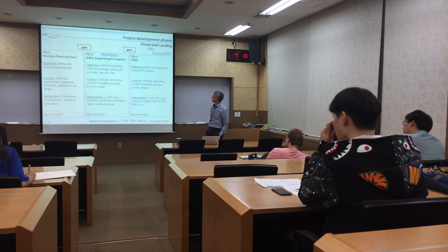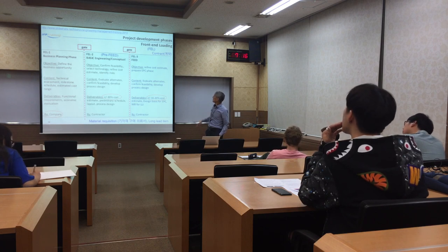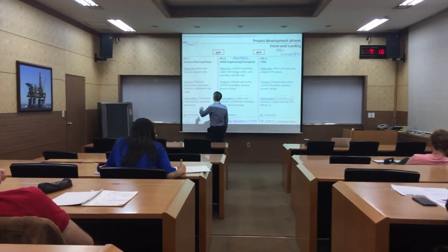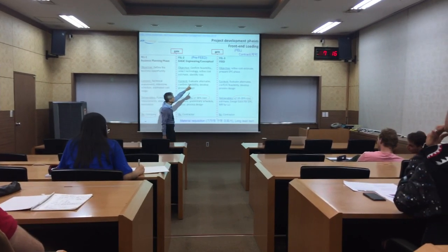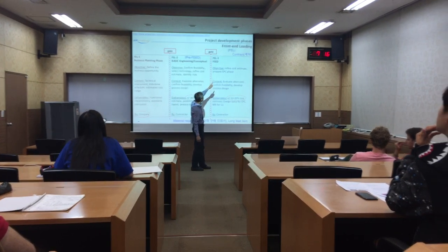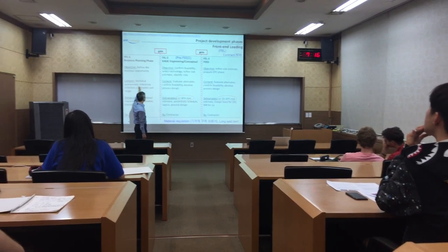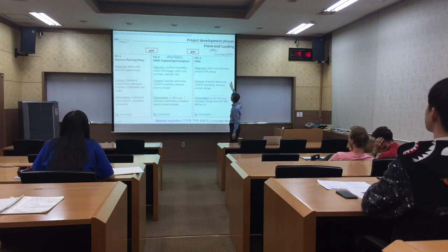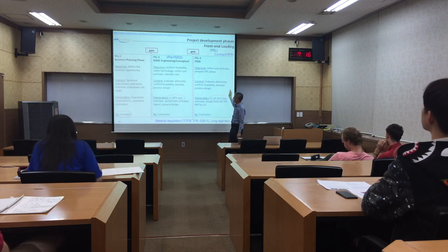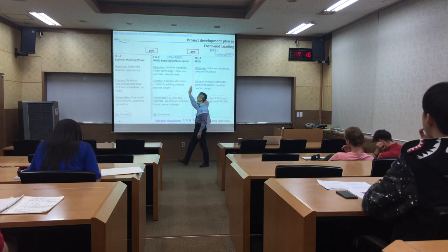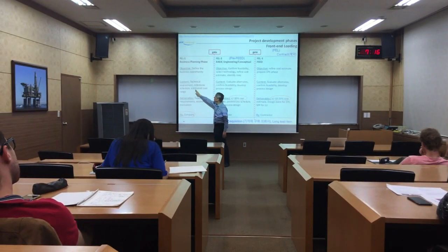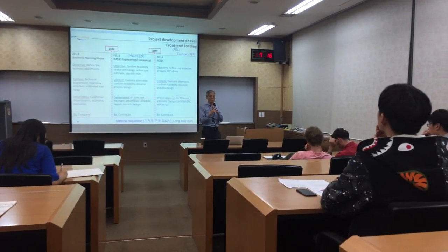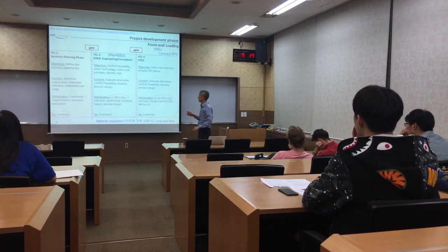That is front-end engineering or loading, the project development phases. They are saying gates. Level one of loading, say FEL, is front-end loading. And then there are pre-feed or feed. We are trying to say feed, and after feed, there can be a contract signing, right? But before feed, there are previous stages, pre-feed and concept screening or planning phase. That can be a very small, shorter cycle of work inside the oil company, probably.